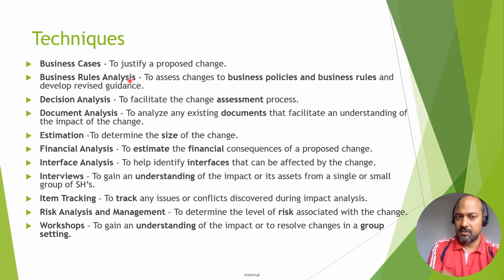So business rule analysis to assess changes to business policies and business rules and develop revised guidance. Decision analysis to facilitate the change assessment process. Document analysis to analyze any existing documents that facilitate an understanding of the impact of the change. Estimation to determine the size of the change. Financial analysis to estimate the financial consequences of a proposed change. Interface analysis to help identify interfaces that can be affected by the change.